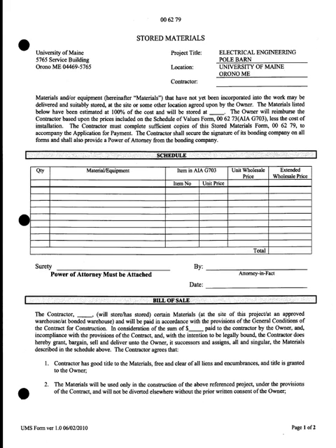Stored materials. This is if they want to get paid for materials that are stored off-site. We need to know what they are, where they're at, and that they've actually paid for them.